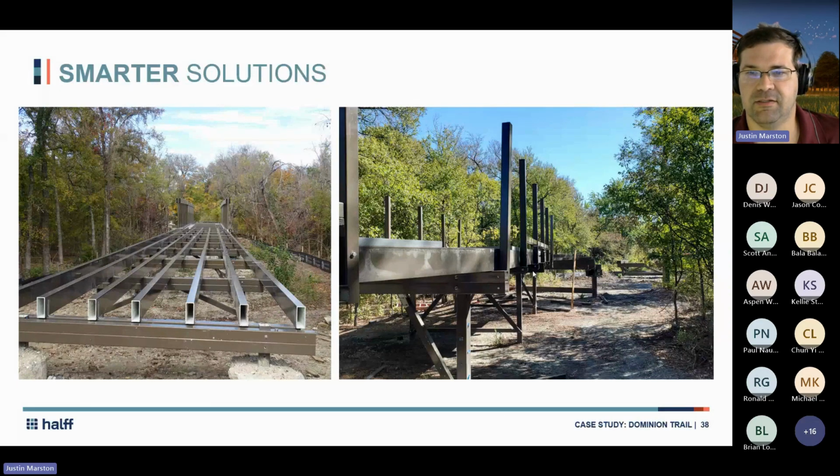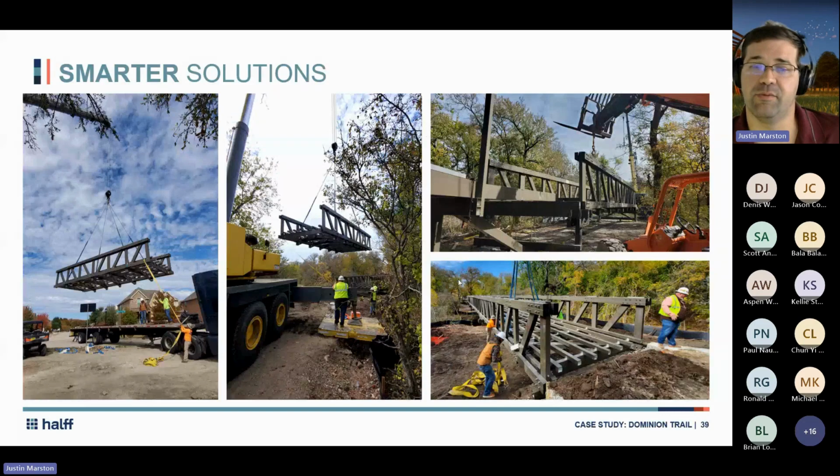Once you do that, this is where we brought our bridges in, and we had several different size bridges. These were all brought in on truck, and they were all fully assembled. Being able to bring those up over the treetops was a really spectacular sight to see. One of the biggest challenges we actually had on this was just getting the bridges to the construction site. That is one thing I'm going to make sure of, the logistics of getting your stuff to your site. These were 70-foot bridges.